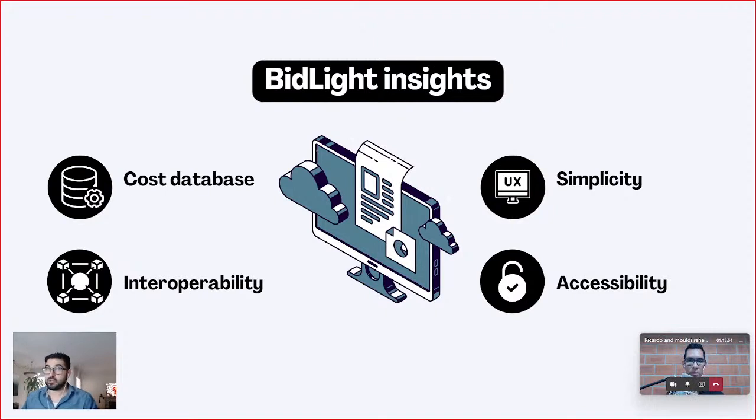What you need to do here is skim through it and make sure that this is what you get. Maybe you have a better manufacturer, maybe you have great procurement deals, so you can get it cheaper. So you need to take a look. You can't just say okay, the database is fine, it updates. Yes, it updates automatically, but it updates the average. It doesn't update your personal database.